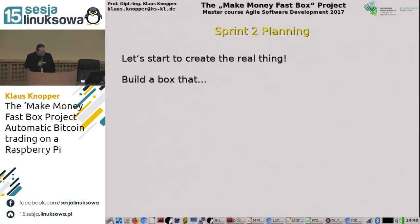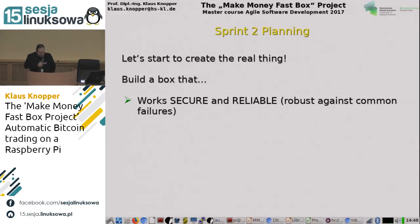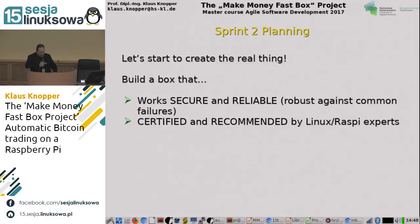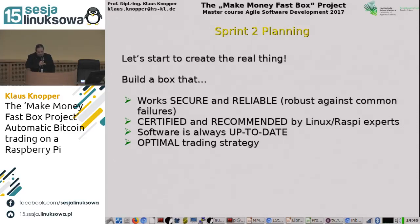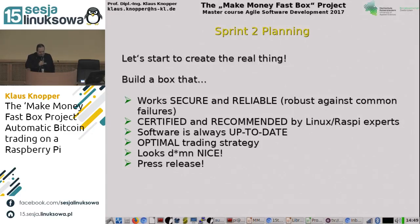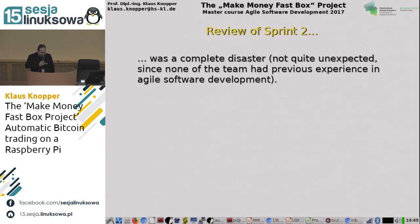Sprint 1 went pretty well, at least I thought so, and everybody said now we're ready to run. So let's build a box that works securely and reliably, robust against common failures like power loss or misconfiguration, certified and recommended by Linux or Raspberry Pi experts — an important marketing point — with software always up to date, an optimal trading strategy producing maximum gain, and a very nice appearance. Unfortunately, sprint two was a quite complete disaster, but not quite unexpected, because it was the first time our students had an agile development project.